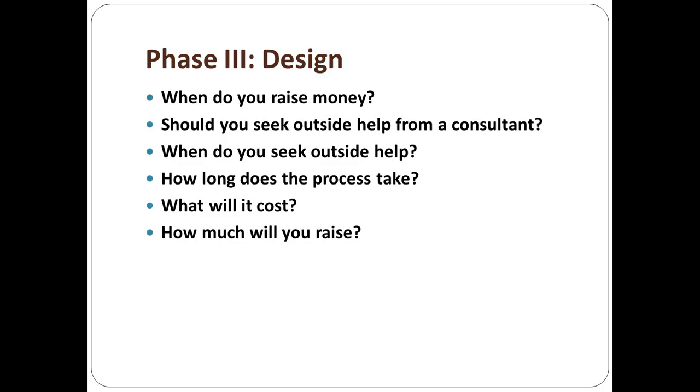You haven't designed it yet, but what you're going to fully design, you've got to subtract what you have on hand and what you're capable of borrowing, and then what your estimated cost of your project is going to be as to how much you have to raise.